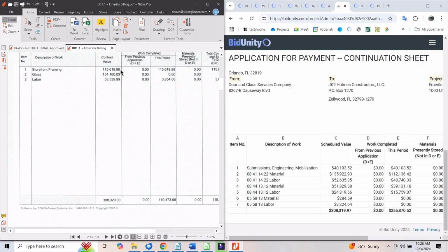They had to pay somebody else, I think it was about $18,000 for the Lexan to get the space conditioned, and clever people as they are, and everybody that we do business with is smarter than we are, they looked at our schedule of values and they said, oh my gosh, Doran Glass has more than half of the contract amount, it's just glass. They already did everything else. This company we have doing this acrylic Lexan temporary stuff, they're charging us $18,000 to put in all of this stuff. I wonder how much would it be for them to put in all of the glass for the whole thing.